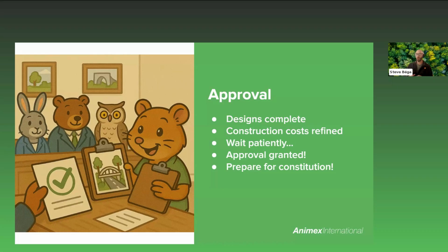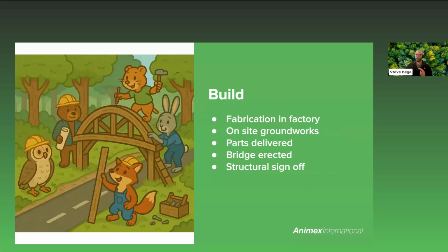A typical cost we have seen for AIPs ranges again between £5,000 and £7,000, and then combining the design fees and the AIP, you're looking at around £10,000 to £15,000 per bridge within the UK. Then once everything is approved, you're looking at getting everything built.